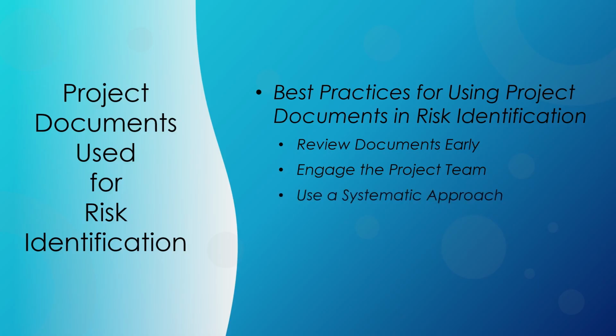Review project documents systematically to ensure comprehensive risk identification. Create checklists or frameworks to guide the review process. As risks are identified, document them in a risk register or similar document. This ensures that risks are tracked and monitored throughout the project.